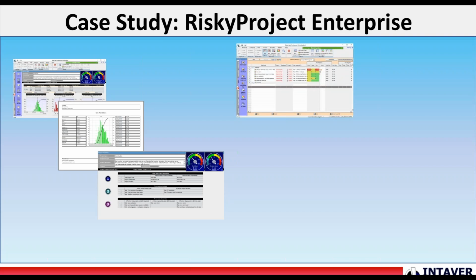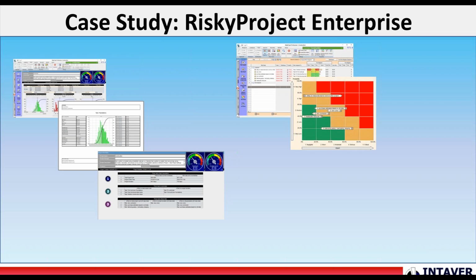They also use a risk rater. Typically, they're using a different risk scoring than the out-of-the-box one. I don't know if you can see here, but they're using a 1 to 5 scoring method that gives you a risk score that goes anywhere from 0 up to 25. That scoring method can be changed depending on how that risk matrix is set up.